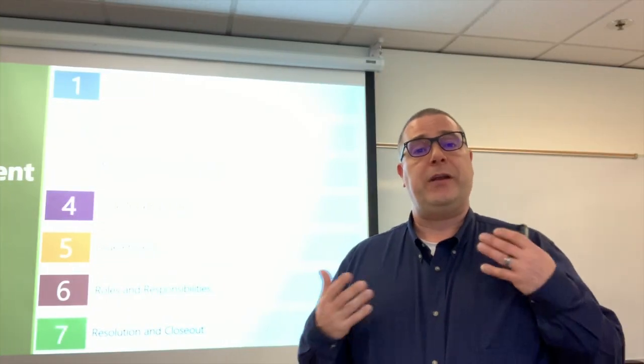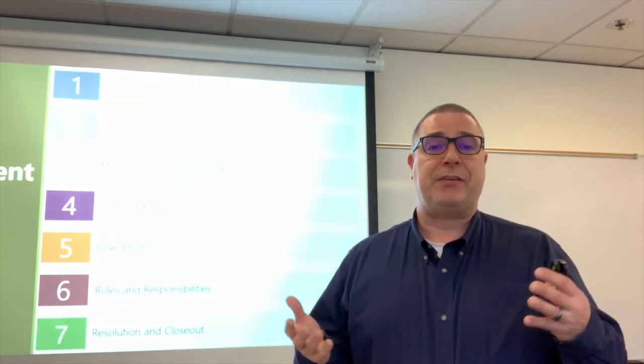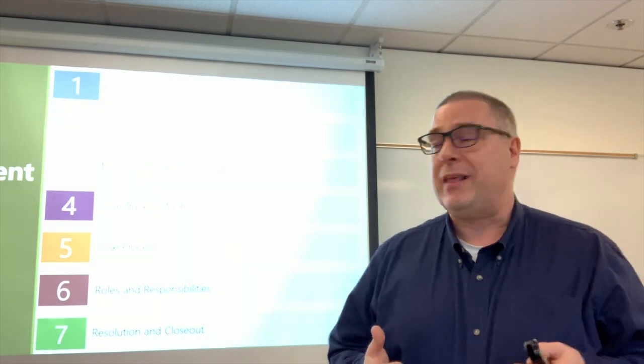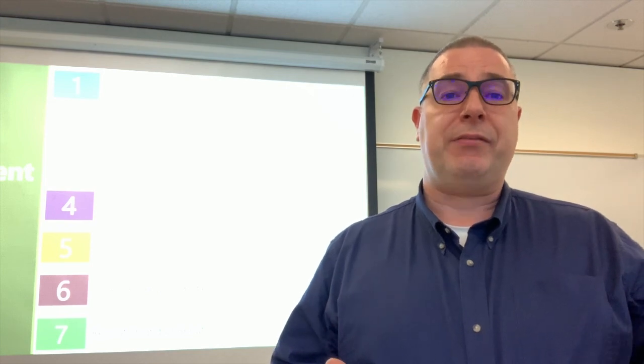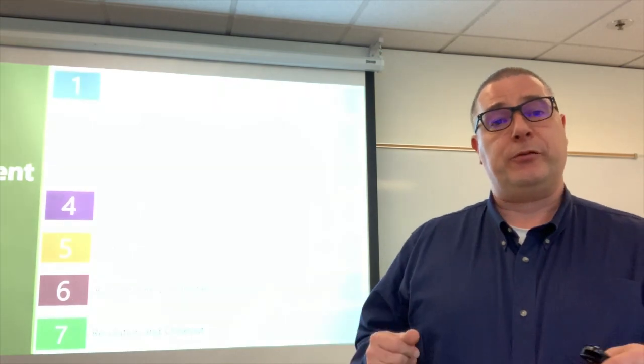The first thing that you do in issue management is create a purpose, right? And so in your issue management plan, you have to have a purpose and really document that purpose. When you think about what's the purpose of the plan, it's really around how you're going to proactively drive the issues on your project. And so that's what you're capturing in an issue management plan.